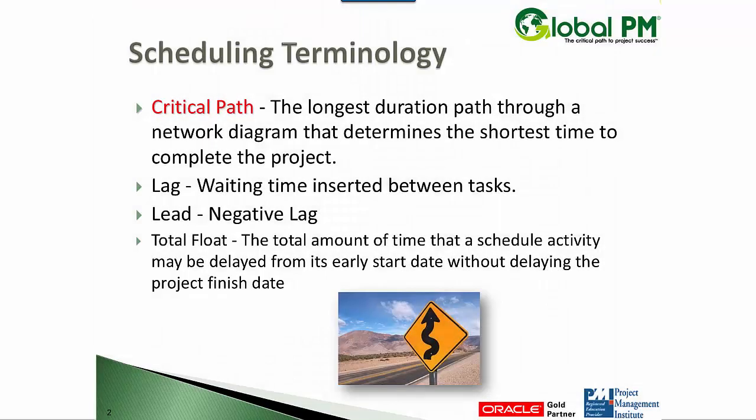Let's talk some terms. Some of the terms you've heard before in scheduling: critical path, lags, leads, total float, and free float. Let's start with critical path. What is it? It's the longest duration path through the schedule that determines the shortest time to complete the project. But what does that really mean? It's the longest path that tells you the shortest amount of time it will take to complete the project. You can finish no earlier than the end of the critical path.